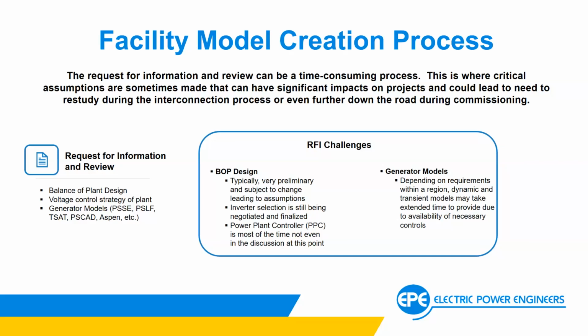And last, the last challenge I see from the BOP design point of view, which we're starting to experience a little bit more on the hybrid plant situation or some solar projects for that matter, is just the power plant controller. Some OEMs, the inverter OEMs, don't provide power plant controllers for sites, and thus a third party power plant controller or an off-the-shelf RTAC or something needs to be used to perform that power plant control function. And this is not even being discussed at these stages typically.